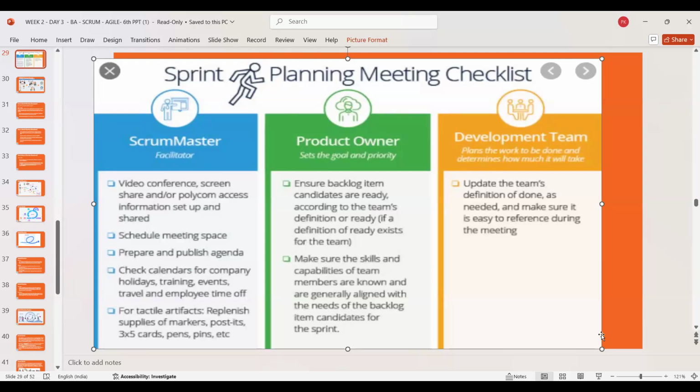You get the point. It's not only that they have completed it, but even if the customer comes in, they should be able to check it. They should be able to see the functionality, and it has to be properly completed. That means there should not be any requirement where we say we are yet to finish this, or any known or unknown bugs, where you check the functionality and it is not working, there is an error or a bug. So this is not accepted.